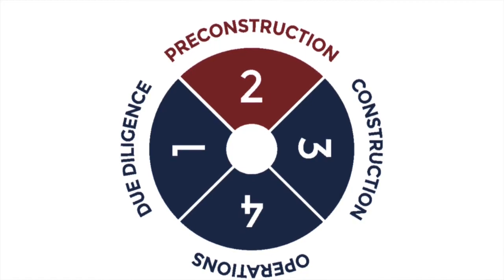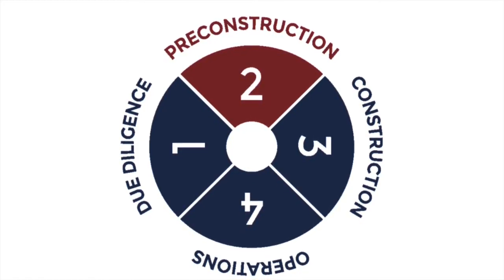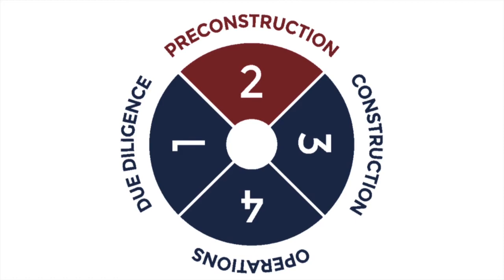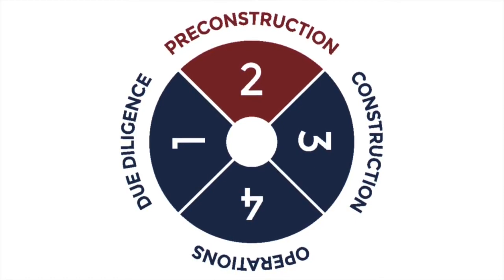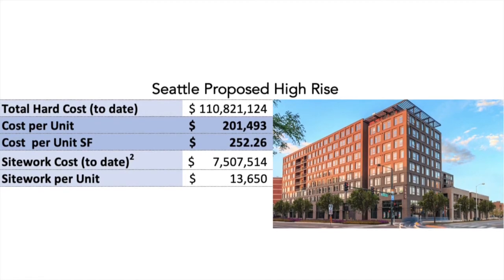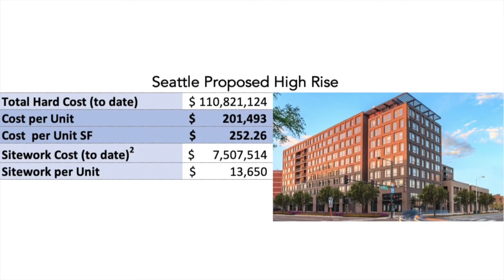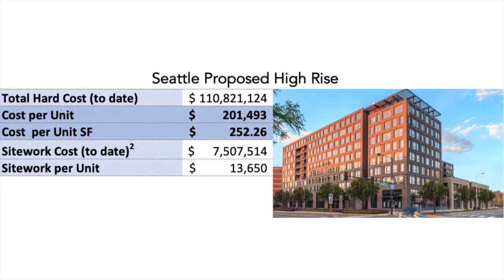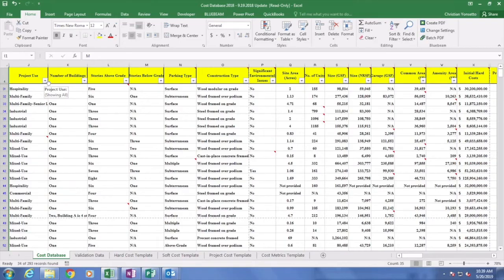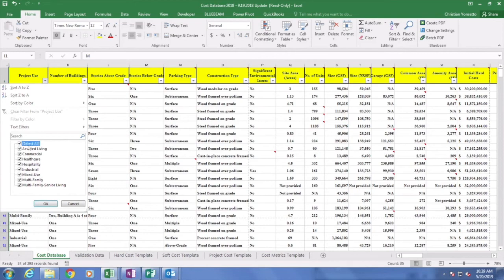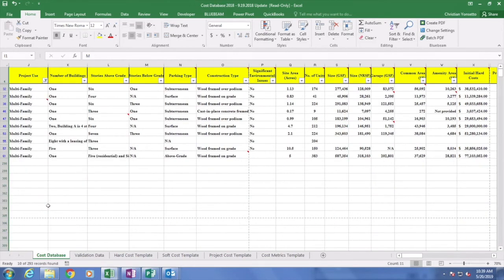During this stage, typically the owner will begin to develop and define project details with a greater emphasis on individual project costs. A costs database based on relevancy can provide an owner with several options. The first option is beneficial if the owner has costs for a proposed project. Fulcrum can utilize costs provided by the owner to conduct a cross-check within the database and assess proposed costs to provide comfort that the costs are reasonable.